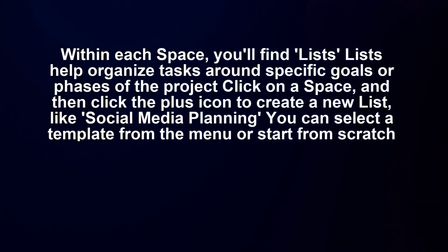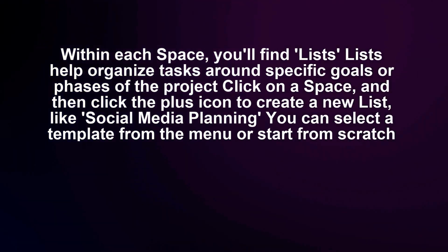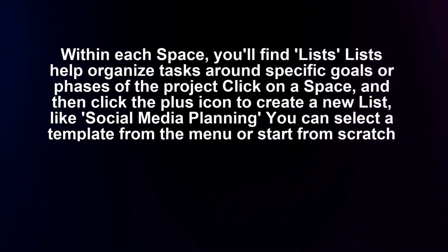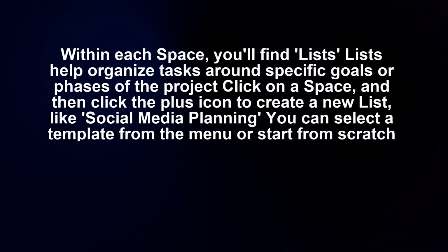Within each space, you'll find lists. Lists help organize tasks around specific goals or phases of the project. Click on a space, and then click the plus icon to create a new list. Like social media planning, you can select a template from the menu or start from scratch.